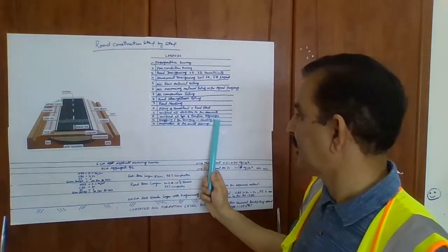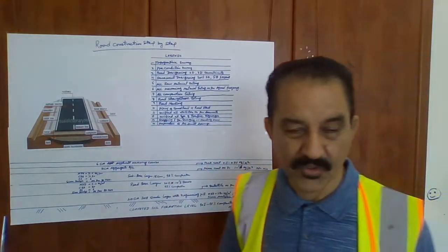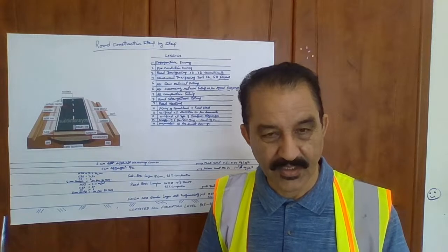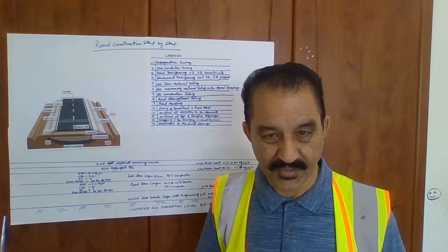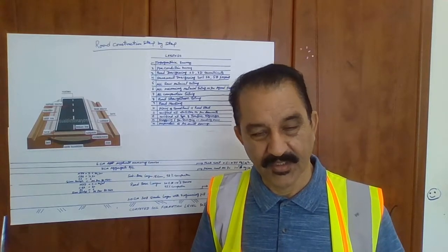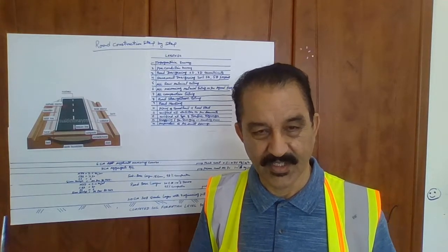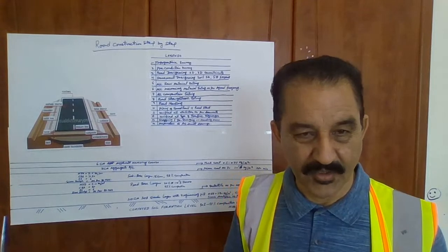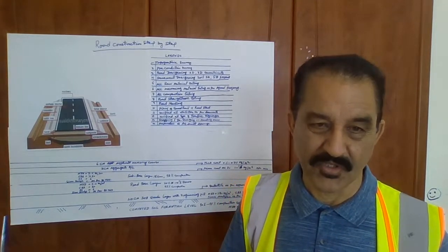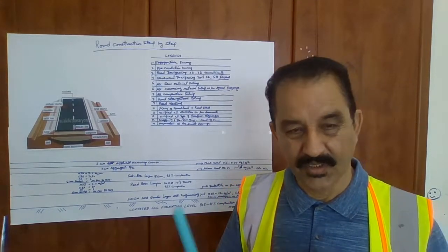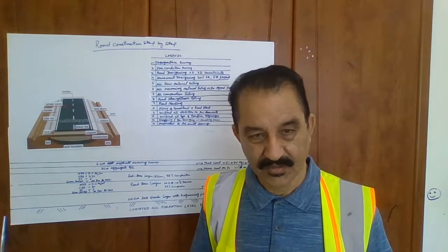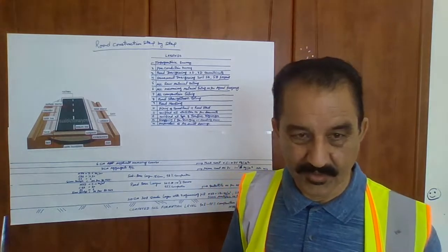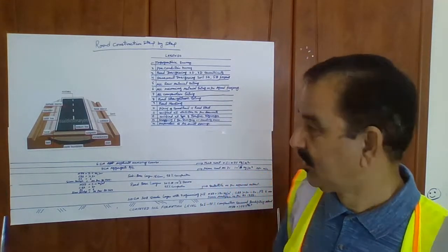Then snagging and de-snagging. Once the road is completed, then the snagging and the completion of the snags, which is also de-snagging. The punch list is also prepared and it should be completed as de-snagging. This is a complete handover, testing and commissioning procedure according to the appropriate manual of the commissioning and the testing handover. This is the complete subject and it should be followed.